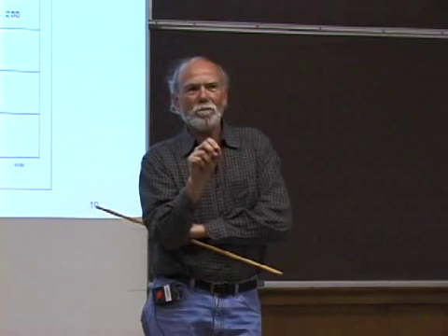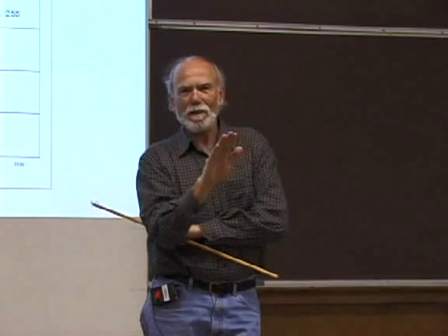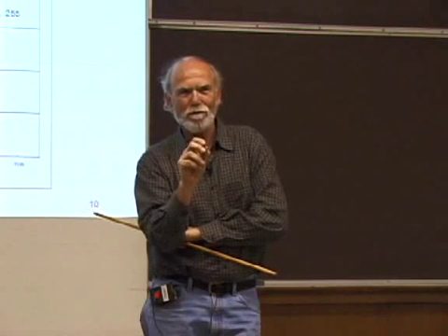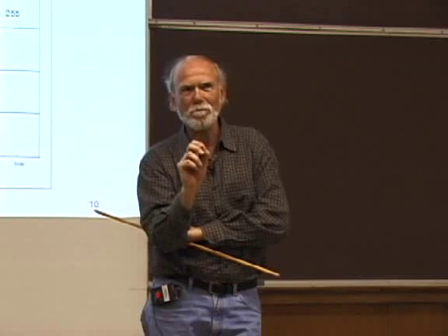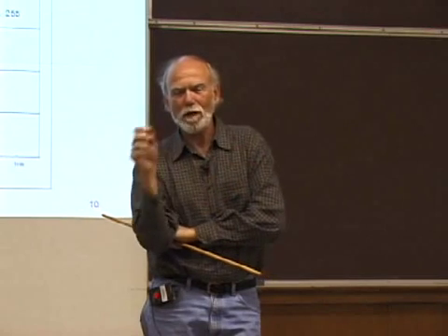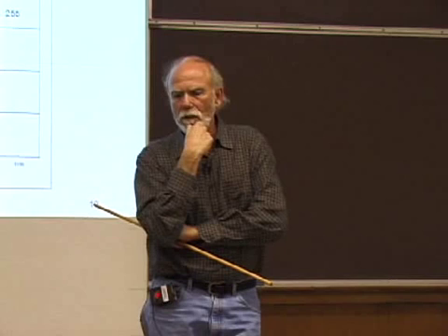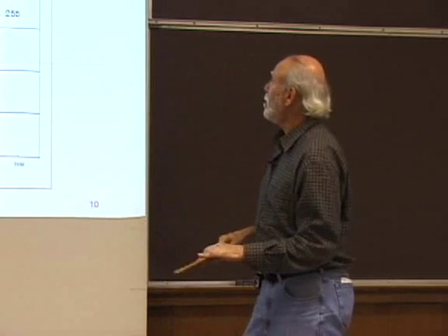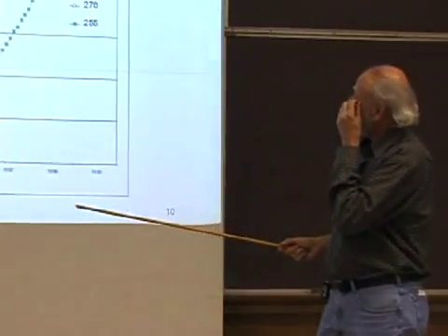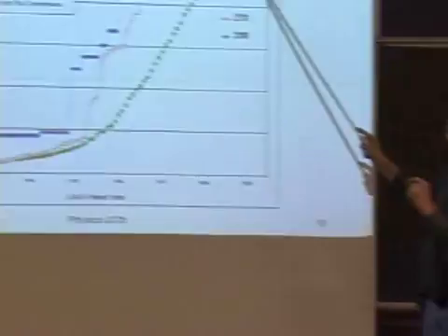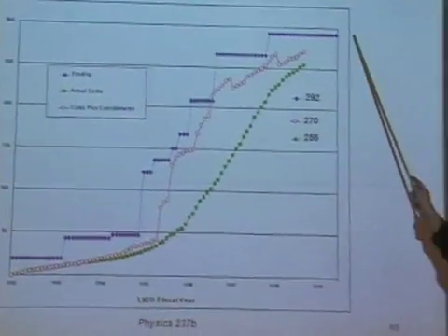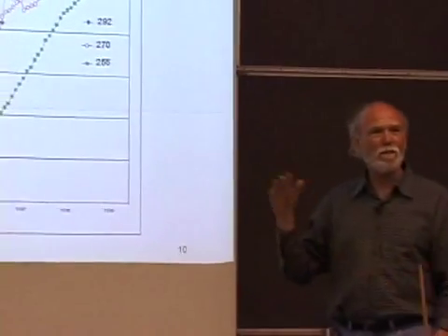We take each one and ask what it costs, not allowing ourselves to do anything other than give the best estimate we possibly can. No fudge factors. So you get the best estimate you possibly can on the numbers at the very bottom. And those numbers are then added up, and in our case came to something like 240 or 250 million out of 290, out of a budget of 292.